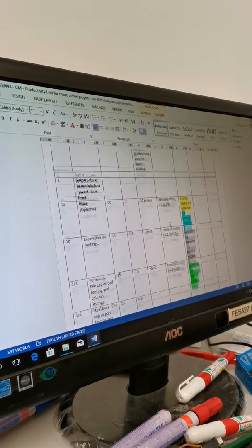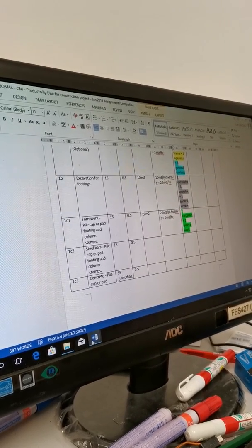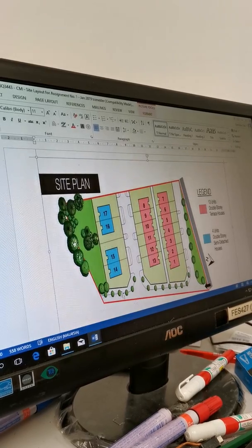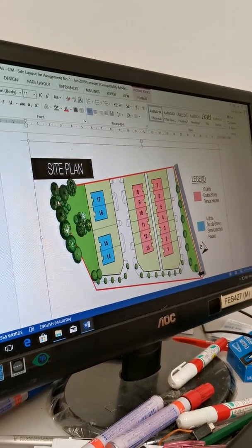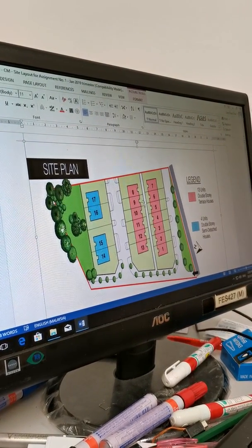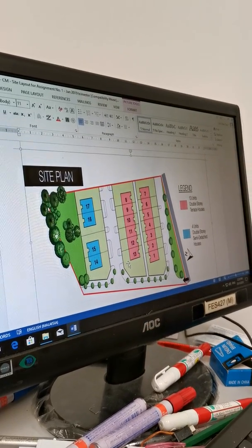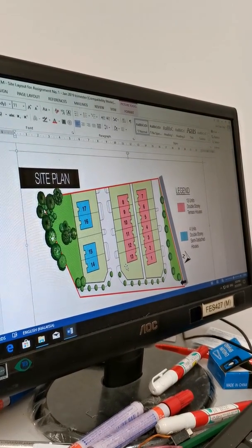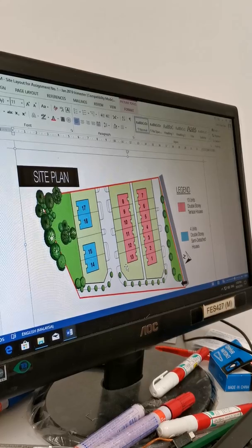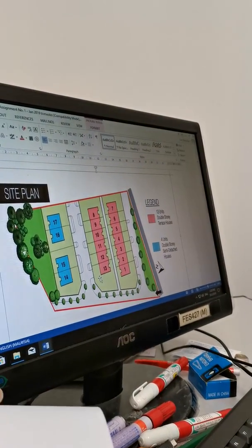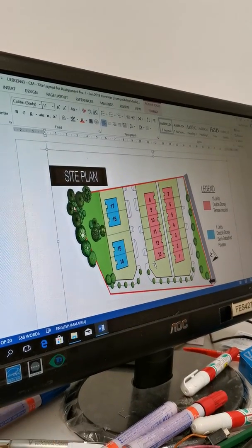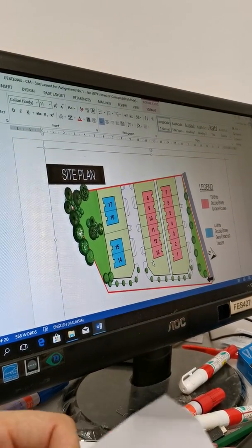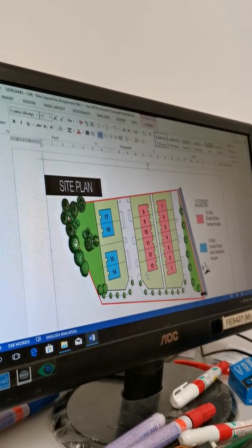So this is a practical way of how the contractor sizes up their temporary building, whether to put it here or here, and how big, depending on people working on a per week basis, or some of them may want to design on a per month basis. Per week, maximum maybe together there are 80 people. Or on a per month basis, you find that on average there could be 90 people.